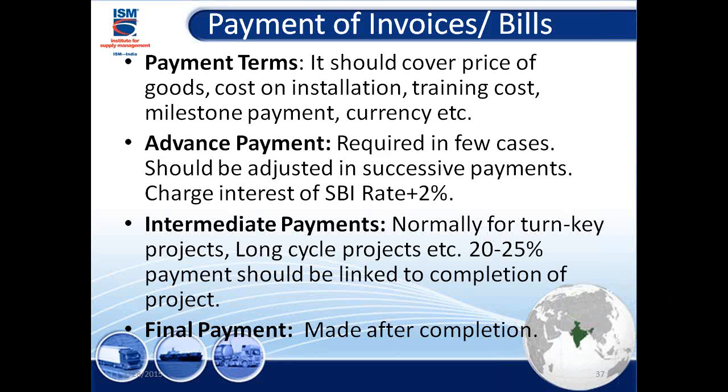What is the price of the goods? What is the cost of installation? What is the training cost? What is the milestone payment? What are the currencies, and what is the exchange rate they're going to use? Is it the exchange rate on the day they gave us the offer? Is it the exchange rate on the day they delivered to us? You have to keep that factor in mind.